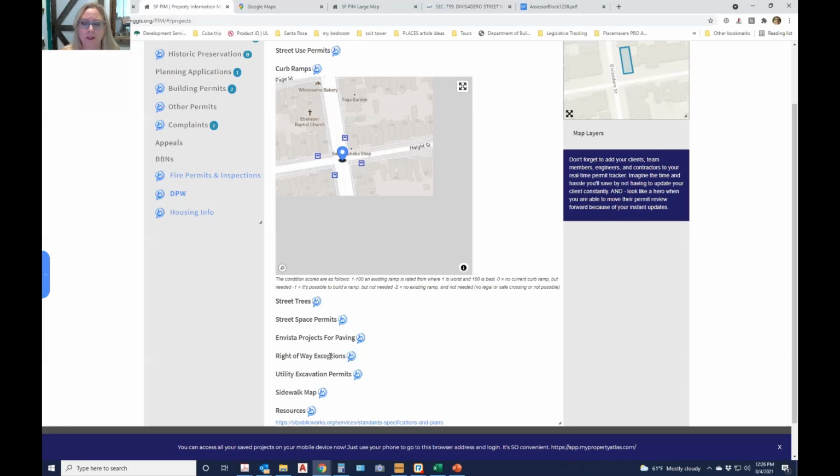The other little sneaky one I'll tell you is the curb ramps. The majority of our work is doing ADUs, which means we're very often taking out driveways. And DPW has this little one-line section in their code that I find very vague, that says if you're making improvements in the public right-of-way, you need to comply with all San Francisco codes. They've interpreted that to mean you have to replace the sidewalk to the new ADA standards. I have a lot of problems with that, but that's how they as a department have interpreted it.